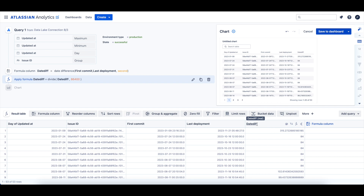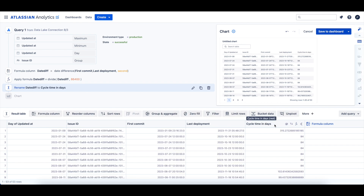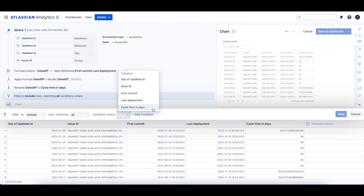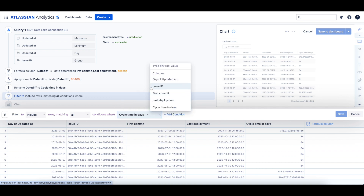Now we can rename our date diff column to 'cycle time in days.' Since the DevOps data is dependent on information sent from our source code management integrations, there can be instances where a deployment date was before the first commit was sent to Jira. To prevent these instances from skewing our cycle time calculation, we'll add a filter step to include only the rows where the cycle time in days column is greater than zero.